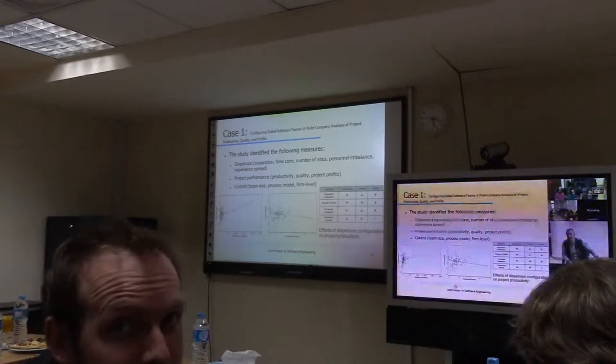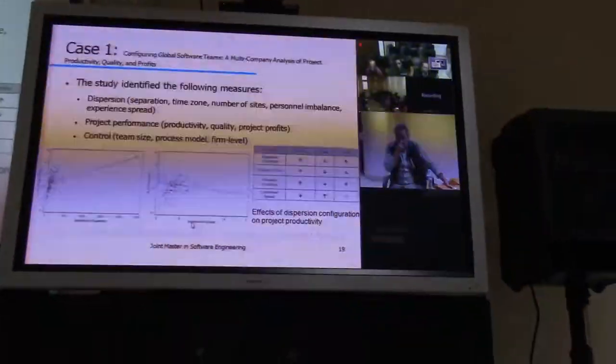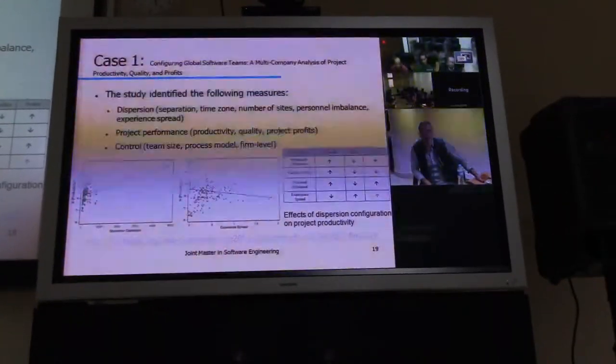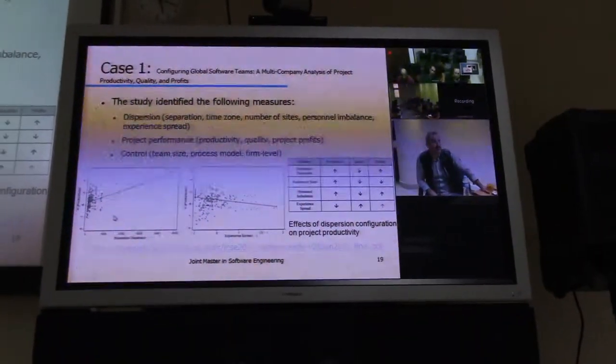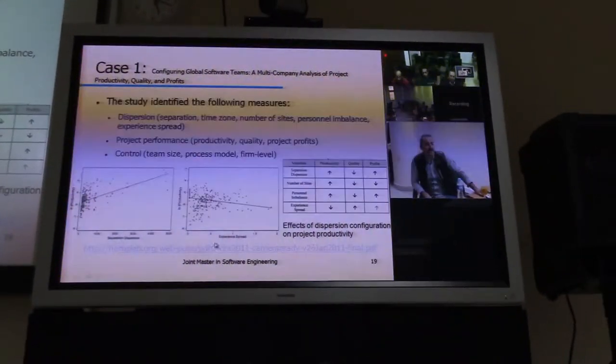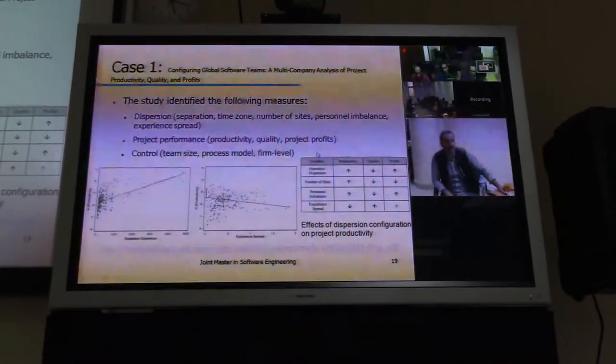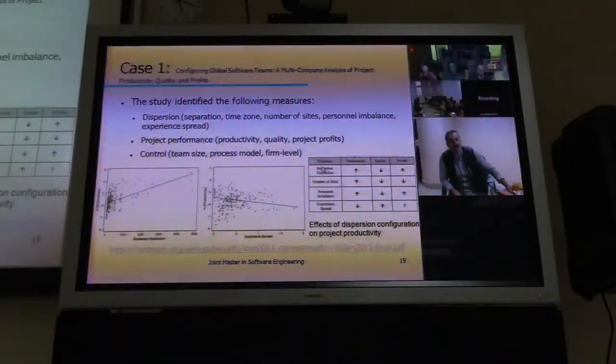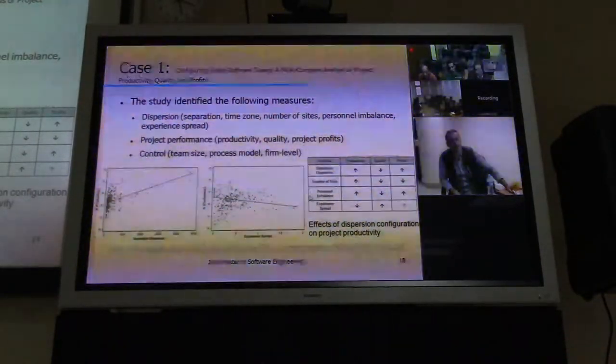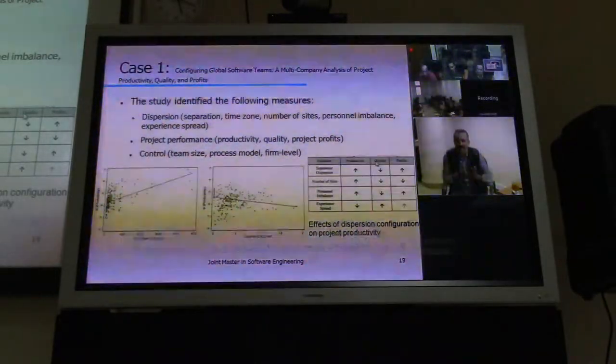As part of the output they have shown, how the separation dispersion affects the productivity, how the experience spread affects the productivity and so on. That is with linear regression. But what they've done is like they've done variables such as dispersion, number of sites, personal imbalance and how it affects productivity, quality and profits.